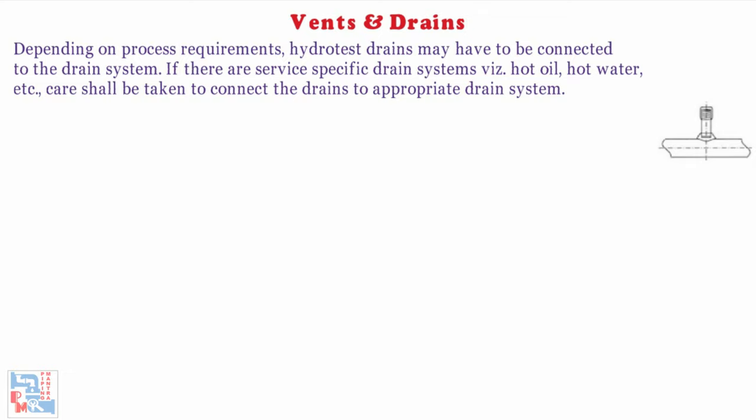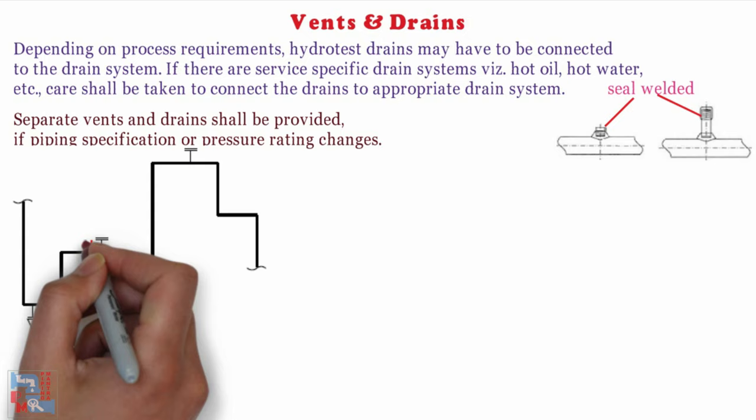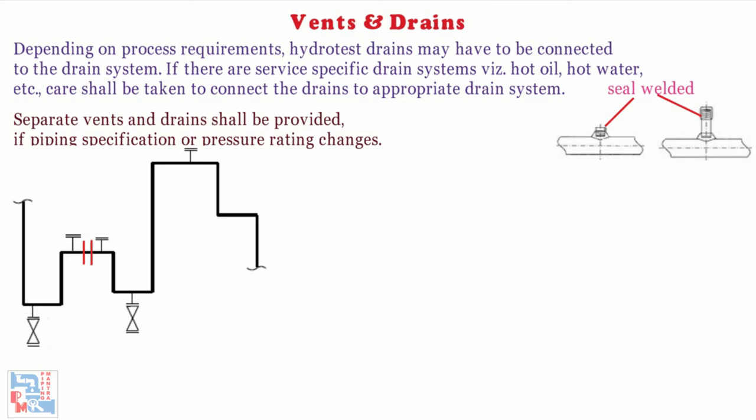Hydrostatic vents not provided with valves but with threaded plugs or caps shall be seal-welded after testing. Separate vents and drains shall be provided on a line in a system if piping specifications or pressure rating changes. If there is a pressure break or class break, we have to provide separate vent and drain for hydrotest, since the hydrotest packs will be different for different test pressures.